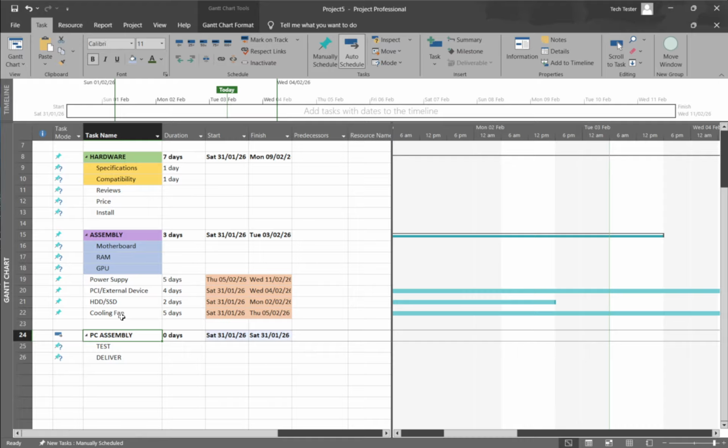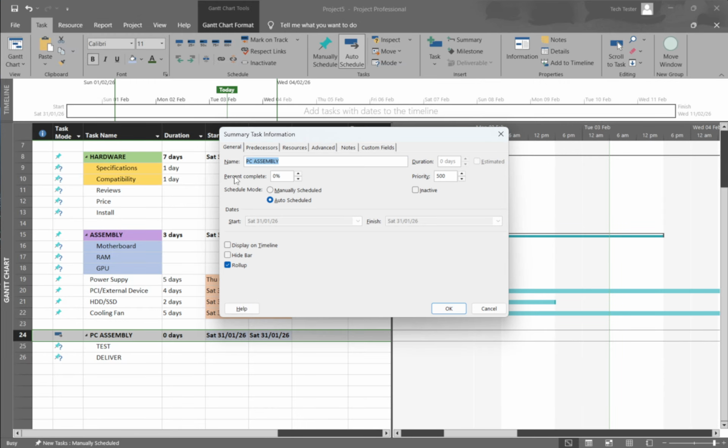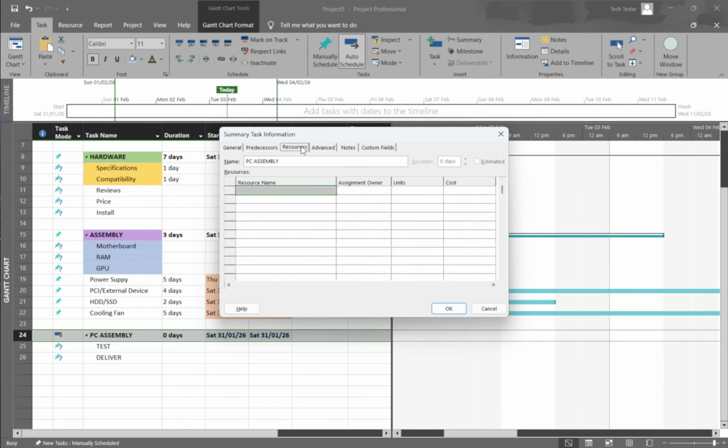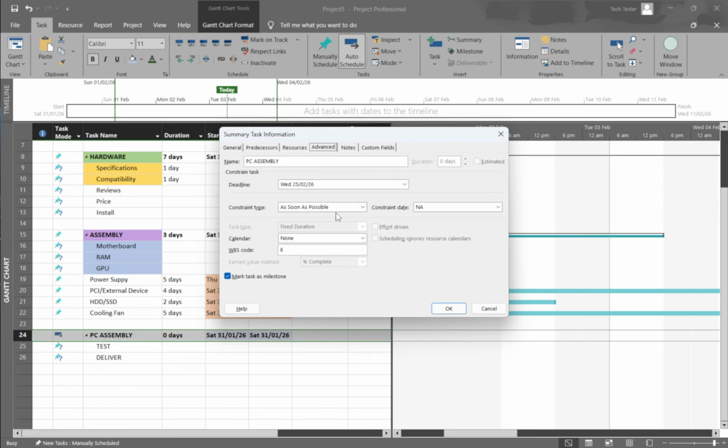If the task still doesn't move as expected, remember that other factors can influence it, such as additional constraints on related tasks, manually scheduled tasks, or non-working time on calendars. But with the constraint reset to a flexible type, you've taken the key step to let the schedule breathe and respond to logic. That's all it takes to remove a constraint in Microsoft Project. Open Task Information, switch to Advanced, set the constraint to ASAP or ALAP, and confirm.